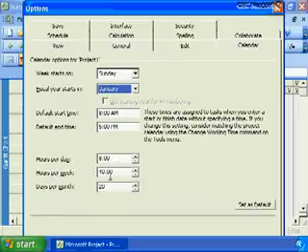Also the number of hours in a week, and allows you to specify a number of days in a month, whether you pick 20 to give you some latitude for vacation time, or whether you pick a more mathematical number of days in a month. These are all options that you need to work through and understand as you're starting to use Microsoft Project. I'll leave them at the standard 8 hours a day, 40 hours a week, and 20 days per month.